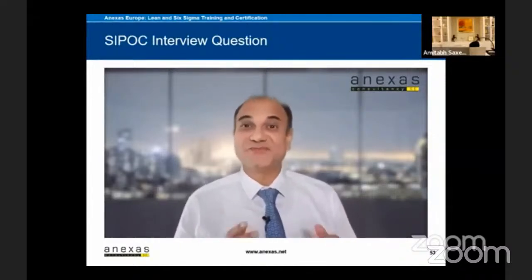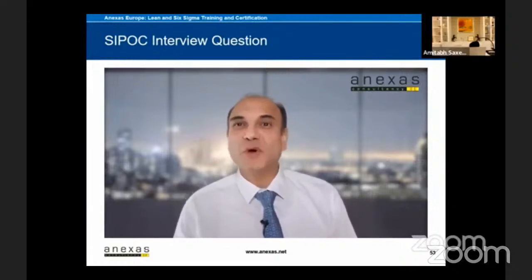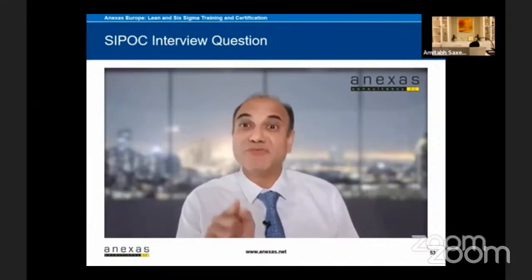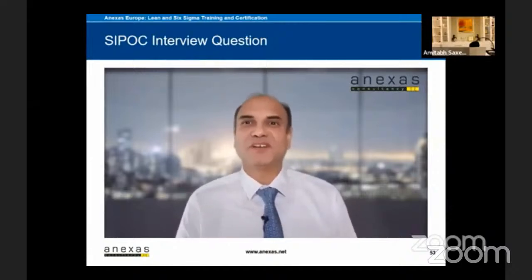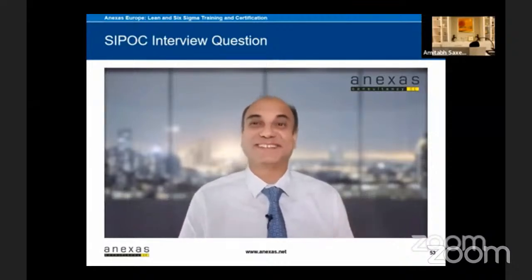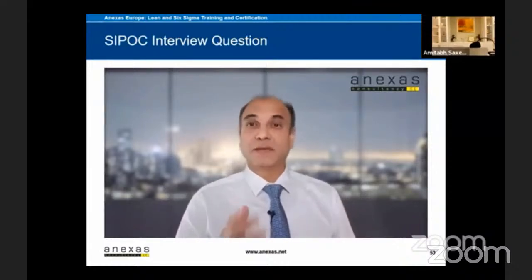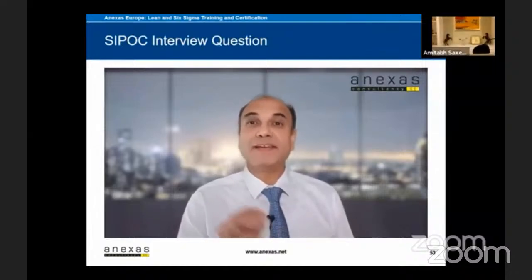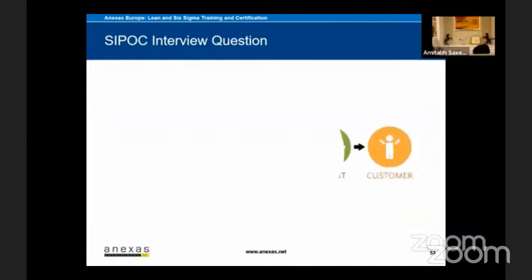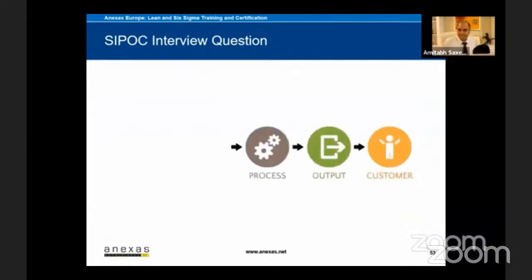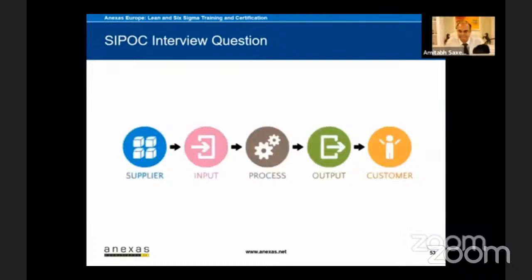It is usually done in the define phase immediately after you have written the project charter. Once we know the project, then we make a SIPOC on the process in which you are doing the project. This helps us to focus on the process rather than blaming the people for all the defects, errors, and delays. To make a SIPOC, we move from right to left. That means we start by identifying the customers, then the output, then process steps, and the inputs and the suppliers.